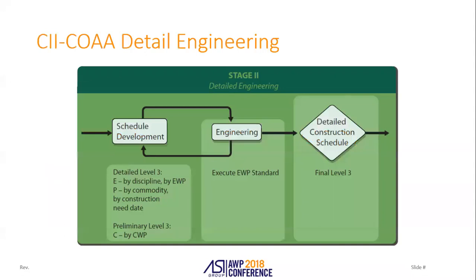The EWP is part of stage two, the detailed engineering phase of the project. The schedule should be developed to a level three prior to going into detailed engineering, and really all engineering is doing at that stage is executing EWPs and issuing them to meet the construction schedule.